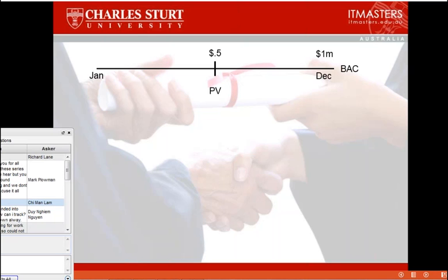So it depends where you are on the line there; that determines how much of your budget is allocated at that particular moment in time. Now, if we look at the work that we've done, we measure the work and we suddenly realize, hold on a second, we've only done 40% of the work, but we're halfway through the project. We should have delivered 50% of the work. So the value of the work that we've performed is only 0.4 million.